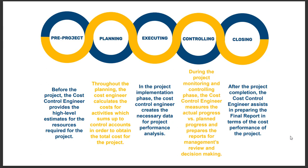The cost-control engineer helps the business analyst of the organization carry out those calculations. Besides that, he or she provides a high-level project budget which can be measured against the revenue or benefits from the project, and then a decision is made on whether the project should be undertaken by the organization.